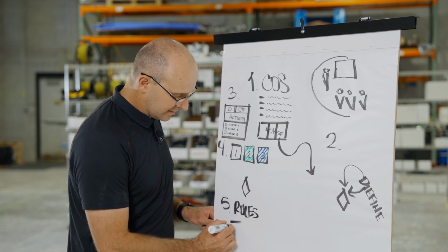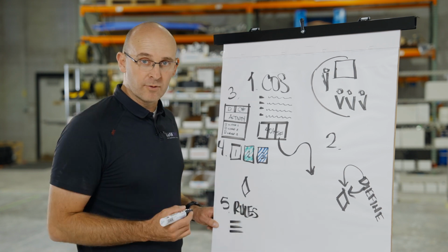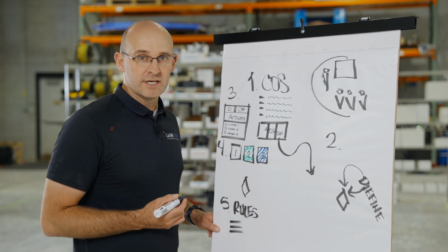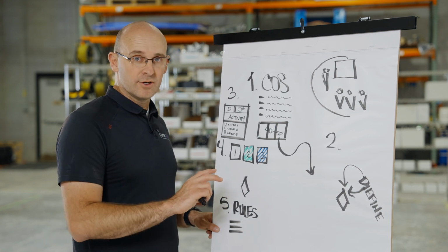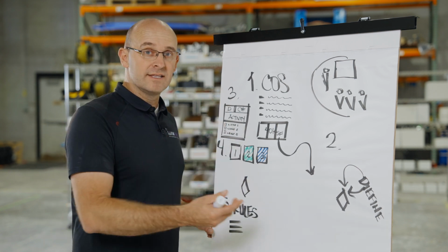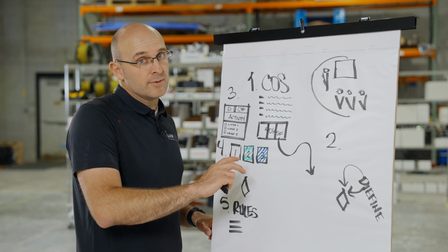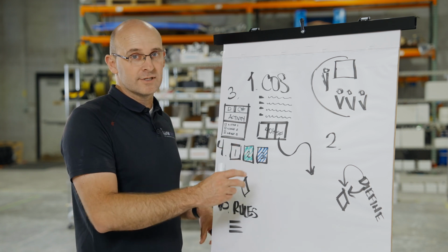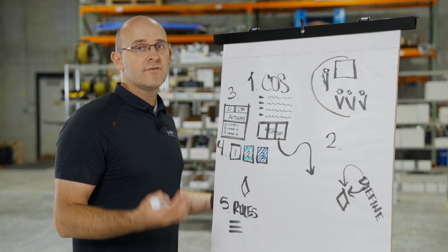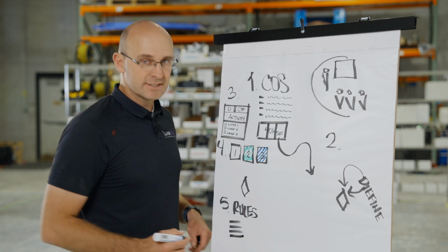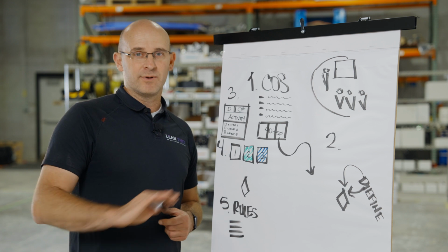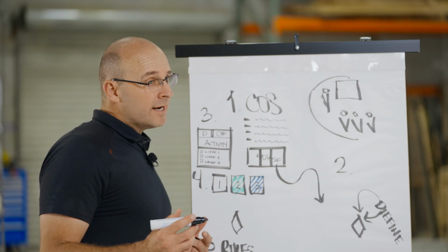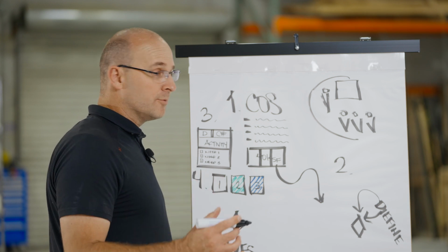And you'll go ahead and list them out. Like, hey, we're going to run backwards. Don't touch somebody else's sticky. One conversation at a time. Key milestones are identified this way. If it's a problem and we don't have all needed resources and it's a roadblock, we go ahead and turn the sticky diagonally. Whatever the rules are, go ahead and list those here and make sure that everybody's on the same page, and you'll be set up for success. All right, and step 6, we are off to the pull plan.